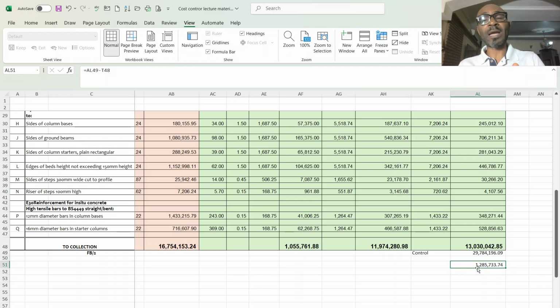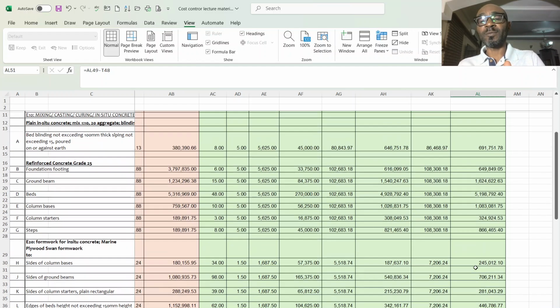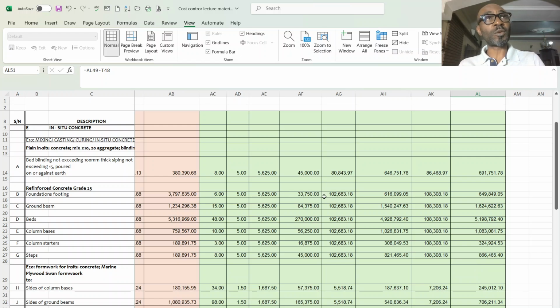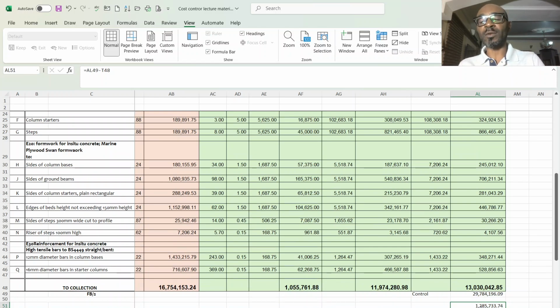So if you multiply the quantum of granite I need to buy to execute the remaining concrete work, I'm going to incur an additional 1,200,000. So we are going to leave it in this manner, then see how it will affect the profit we projected we are going to get at the end, in subsequent documents that I'm going to be displaying.